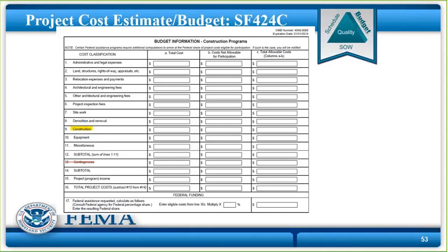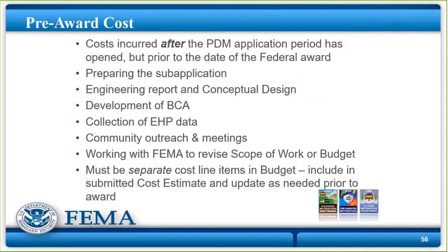It's going to skip over everything in the middle and come down as the total allowable cost. So if your project cost was $100,000 and you put in your match as $25,000 in column B, column C would deduct it. And you would get a project grant award for $75,000 instead of for $100,000. That makes sense? Okay. The budget's super, super important, so working with me, okay.